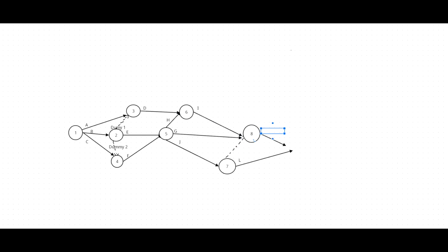Then we start K. The next one, for the M, complete K, L. Now K and L we can complete after event number 9, because you can see the K, L start in different events.